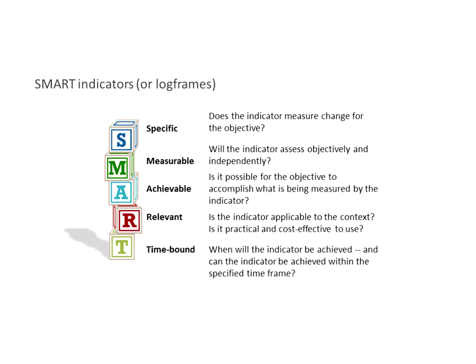Most of us have heard this: SMART, specific, measurable, achievable, relevant or realistic, sometimes time-bound, that indicators need to be all of these. And yes and no. More and more we're saying that the log frames themselves as a whole need to have all of these components. If you tried to put all of these into every single indicator, they might be a bit unwieldy or too long. We used to say when the SMART first came out that the objectives needed to be SMART. Then they said later on that the indicators need to be SMART. I would say the log frames need to be SMART.